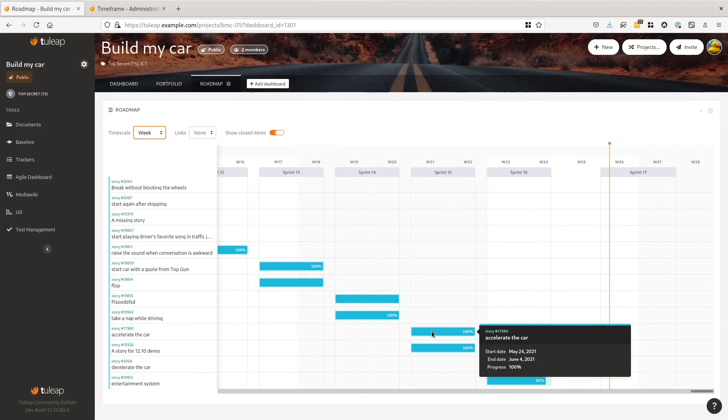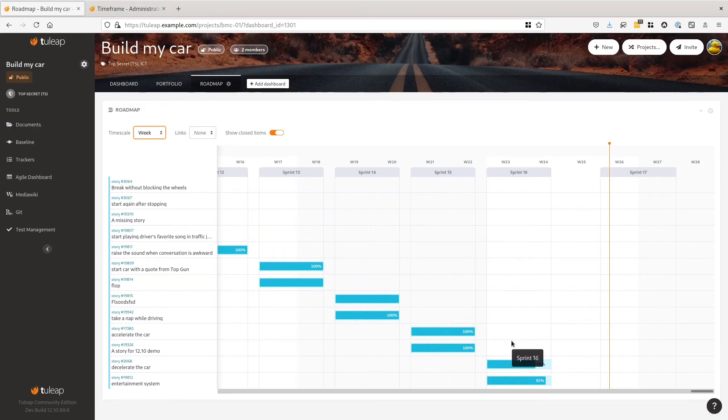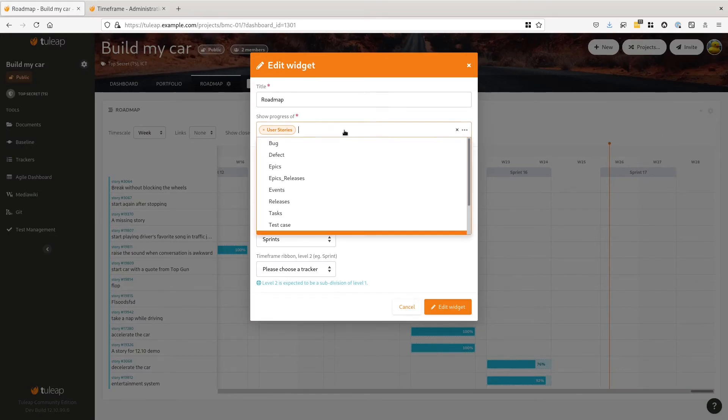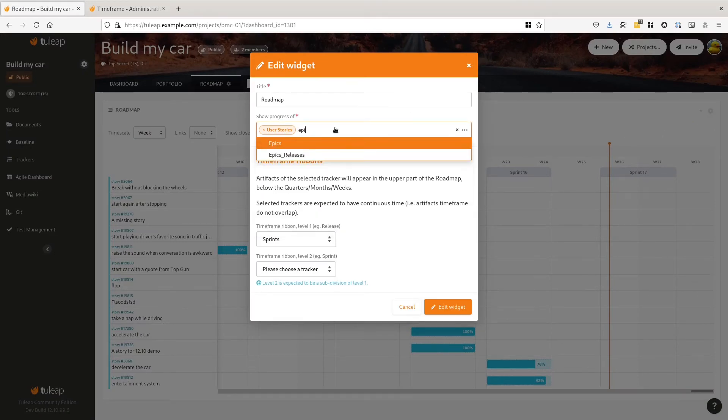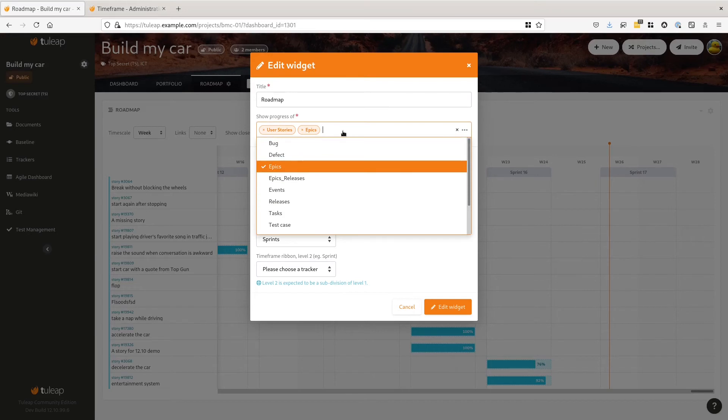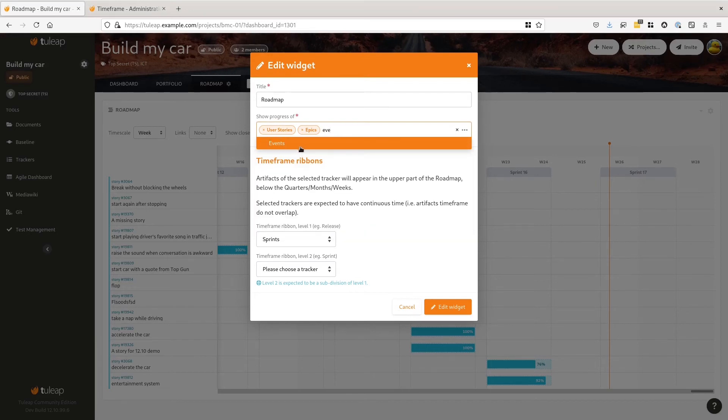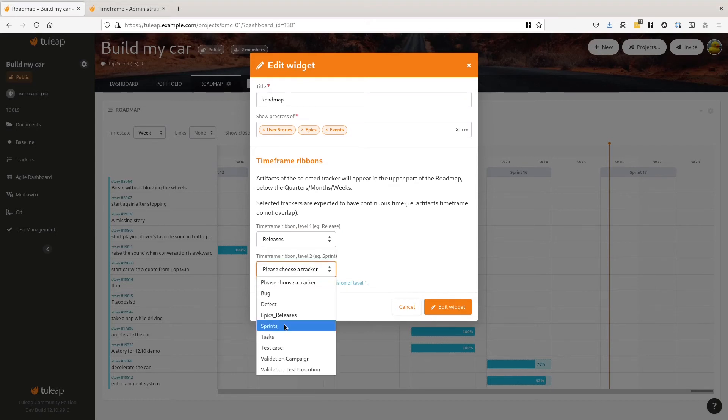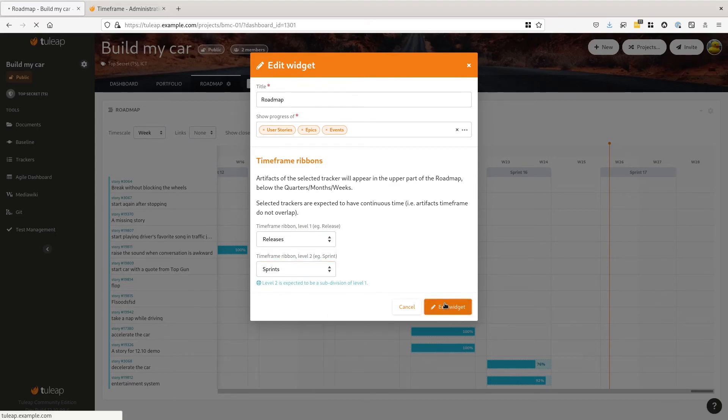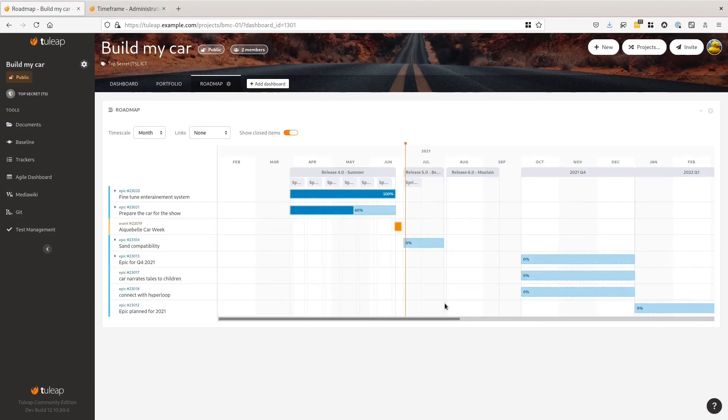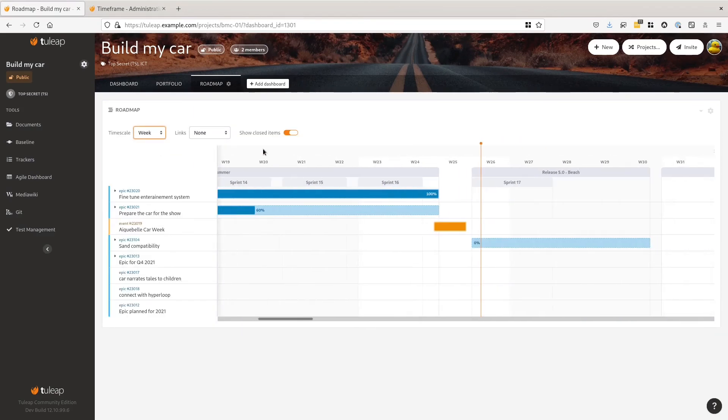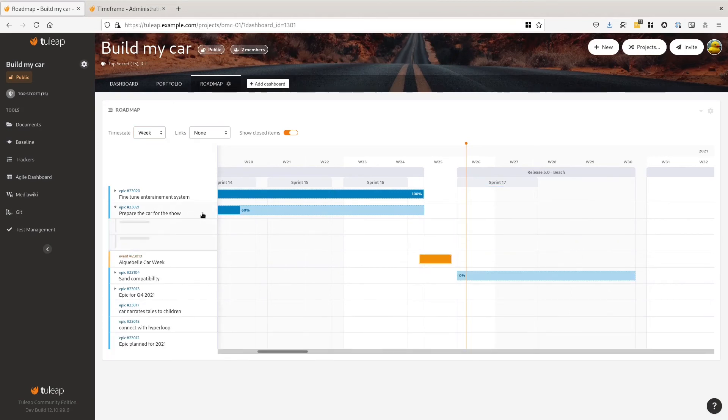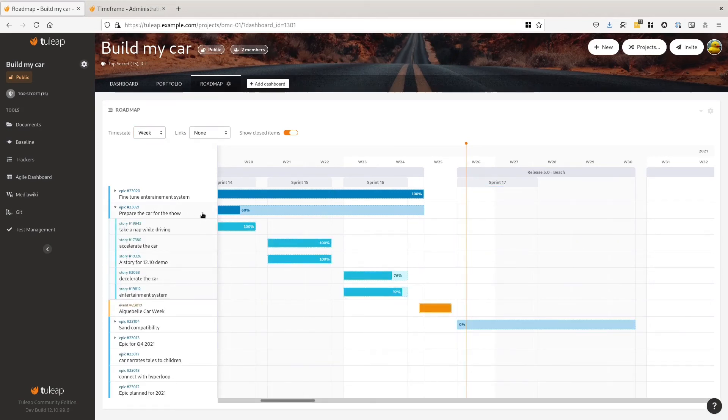Now that you've got the trick, we are going to make the full widget as we have shown at the beginning. We are going to display the epics and another tracker called events, in addition to stories. And we are going to display 2 levels of ribbons, one for releases and one for sprints. And then you've got your agile roadmap. Epics are planned for releases, stories for sprints. And it's clear when things are going to be released, and it's done without even managing dates and activities.